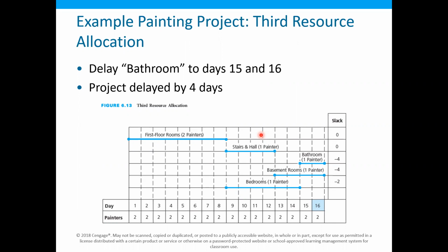So Microsoft Project will provide you two types of resource leveling: within the resource constraints or outside of the resource constraint. So one is the resource level scheduling, the other is the resource limited scheduling. So we can use Microsoft Project. And in Microsoft Project, you can apply the resource leveling to one activity or to a set of activities or through the whole project as well.